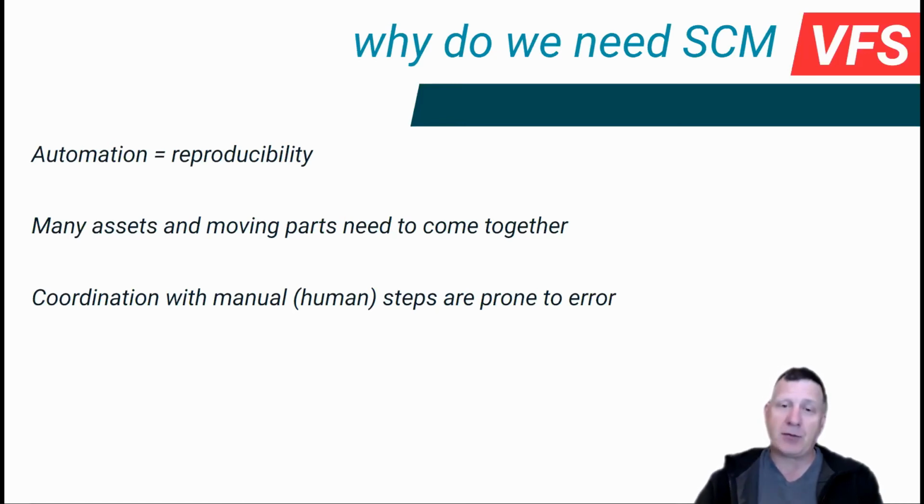You can also change the frequency of it. So if you're not on a continuous build cycle, you might decide to build one build every day and test it in the morning and see what things need to be addressed that day, on top of the features of the day, what things are broken. As you get towards a milestone, you might accelerate that to 2 builds a day, one at lunchtime, one overnight. So you get this kind of continuous progress report on where you're at.